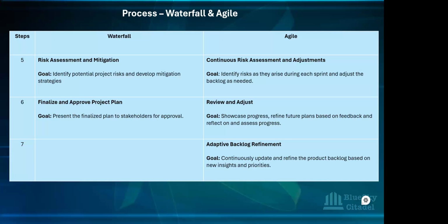So for example, if you're still using the online website for a bookstore that we're looking at, your risk could be delay in development, and then a plan is put in place. Part of the plan that you can put in place is, when you identify that there's every possibility that there might be delay in development, maybe because of the number of developers that we've put in place. Maybe there's every possibility that the developers might fall sick, and we're looking at the timeline that we want to finish the project.